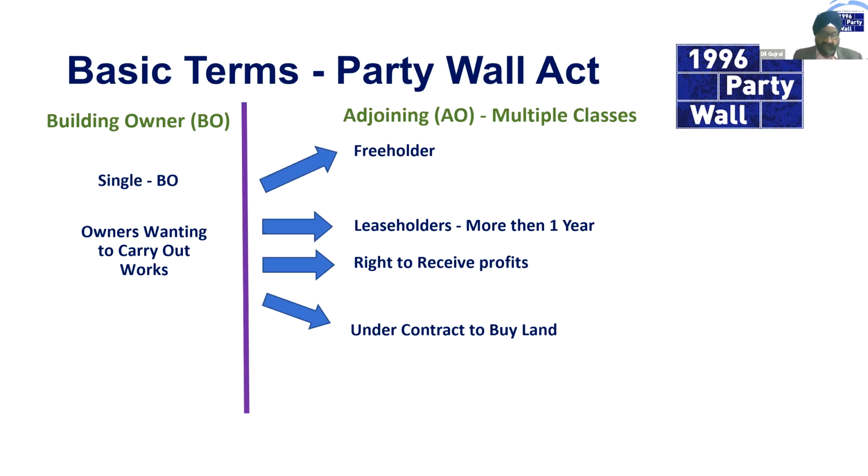So this is a scenario where you've given a notice to your neighbour, who is an adjoining owner, and suddenly the adjoining owners have rung us up and said, actually, I'm not concerned with your works because I'm selling the property. Now, depending on the time scale or how long your works are going to be, it may be the case that you need to engage the new prospective owners, so that if you're not completing your notifiable works by the time they become owners, they will be notifiable owners.